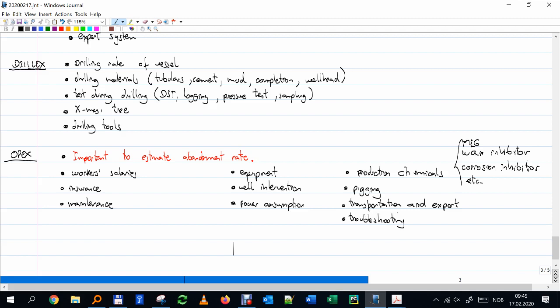Okay, and I just want to make here the comment that troubleshooting, let's say something got damaged, you have an issue that the mixture doesn't separate as quick as you wanted. Okay, so then you have a bottleneck problem. Typically, the problems that I have, they don't cost too much OPEX, but they actually cost loss in revenue. Okay, which that is really the critical part. Not because they are costing more, you need to buy more equipment, but actually because they are prohibiting you from achieving the levels of production that you wanted. Okay, or the highest levels of production.